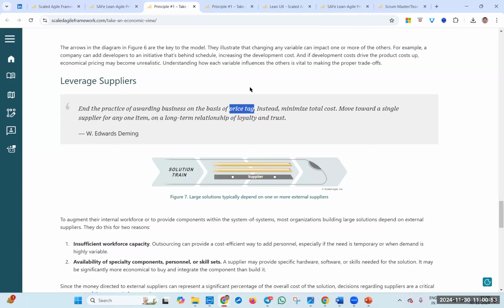Go for the second option. Right? So yes, that is what the organization has to discuss. Again, it is an economic trade-off. The product manager or business executive might say, I have only budget for $1 million. I can't get extra budget. Okay, then we will build an in-house solution, but you have to wait for 1 year. Or if you're okay, get additional budget and let's go ahead with the existing solution.